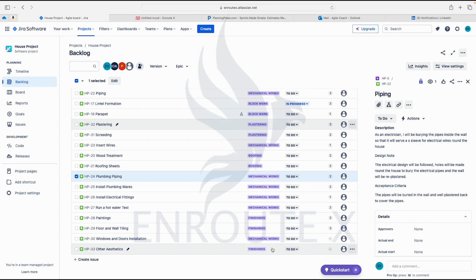So the question is, what if a story cannot be completed in 5 days or in 5 story points? Let me use 5 story points so I wouldn't confuse you that 5 points means 1 day. I had explained earlier that different teams come together to agree what the point translates into. So a technical or software development team could say 1 point equals 1 hour of work, but for this illustration we're equating 1 point to mean 1 day, right?